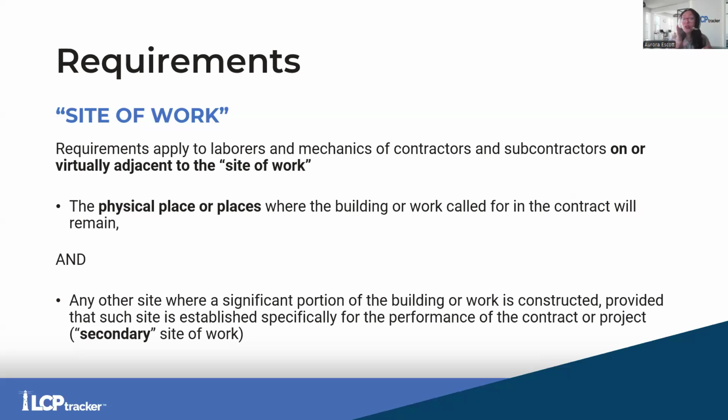But they are providing a service. They are using the tools of their trade. They are contributing to that project. It's just that they are adjacent to that job site. They're a couple miles down that way and a couple miles up that way, managing traffic so that the work can be completed in a safe manner. Those flaggers would be considered on a virtually adjacent job site and would be covered for prevailing wages.